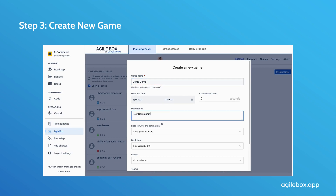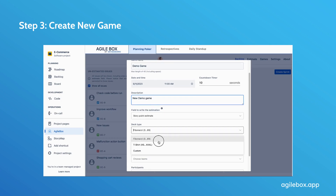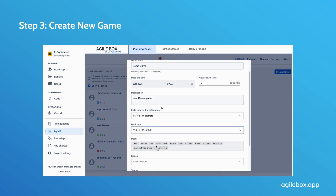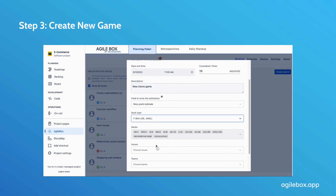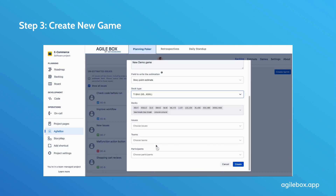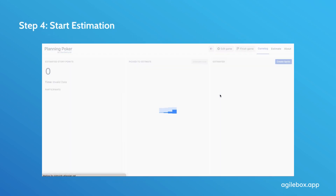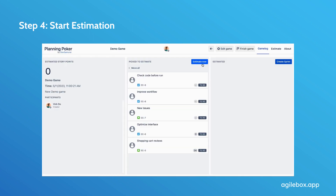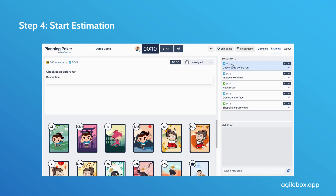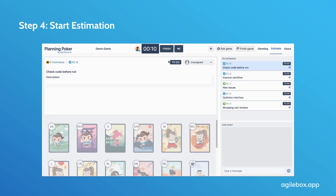You can choose from pre-built options such as Fibonacci or T-shirt size, or customize the deck size according to your team's needs. Then click Create to finish things up. Step 4: Enter the game page and start estimation by clicking on the issue and clicking Start.